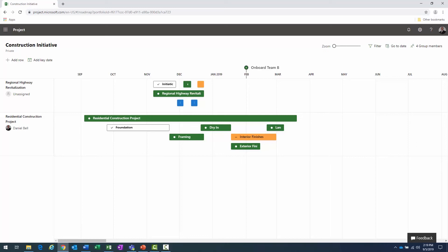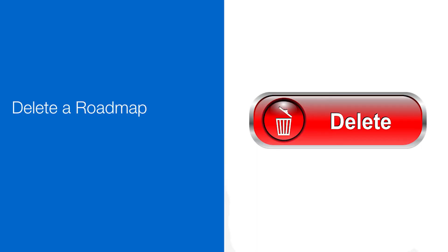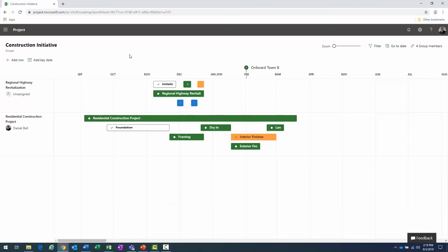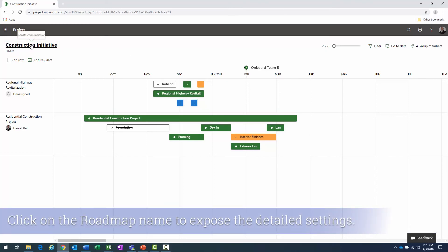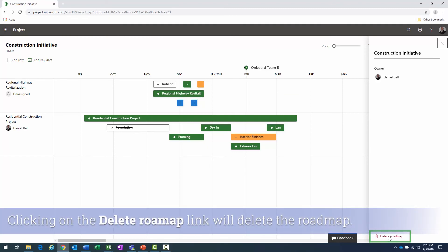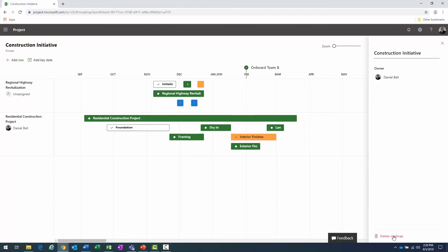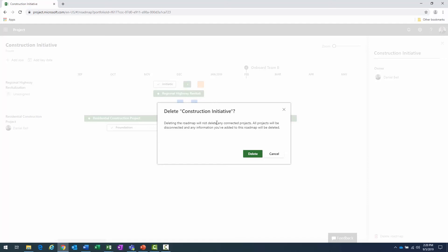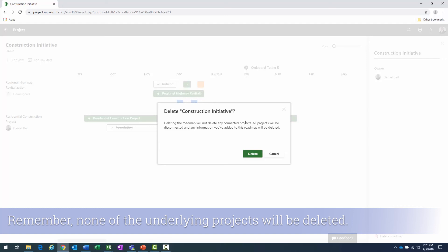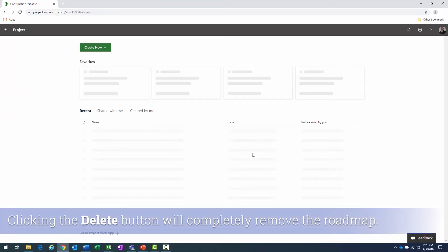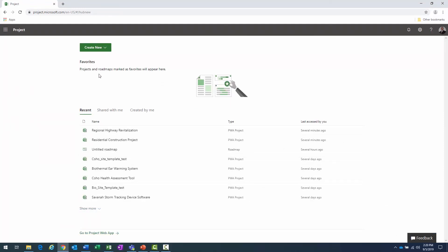Last topic: deleting the entire roadmap. Maybe the entire program is done — how do you remove it? Click on the label — 'Construction Initiative' — it brings up the details dialog on the right. Similar to removing row items, there's a 'Delete' button at the bottom. A confirmation dialog appears: 'You are going to delete Construction Initiative. Deleting the roadmap will not delete any connected projects — all projects will be disconnected and any information added to this roadmap will be deleted.' Click 'Delete.'